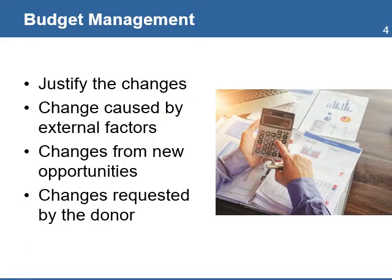All changes to the budget need to be justified. This might come from changes in the external environment, such as natural disasters, social unrest, or economic conditions. The organization may request a change based on new information and opportunities to increase the impact of the project, and even the donor might also request a change in the budget.